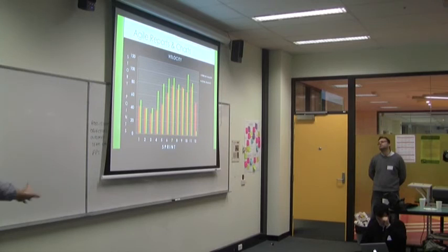And if this was not a technical piece of work and we had a lot of BAs on the team, halfway through the sprint they'd be scrambling to feed the developers more work to hit that velocity. So you really want to get those lines as close as possible. That's what's important, not whether one's higher than the other.